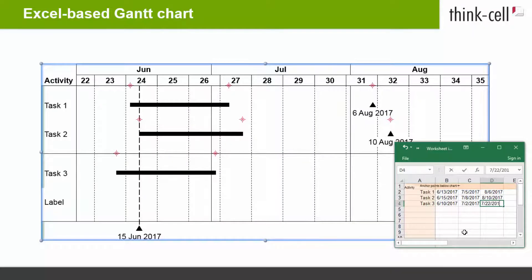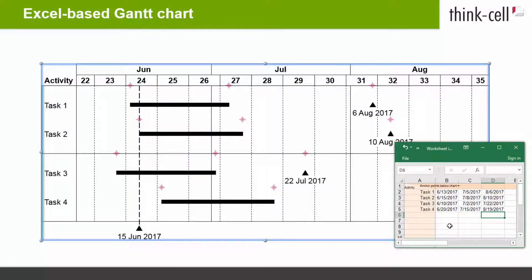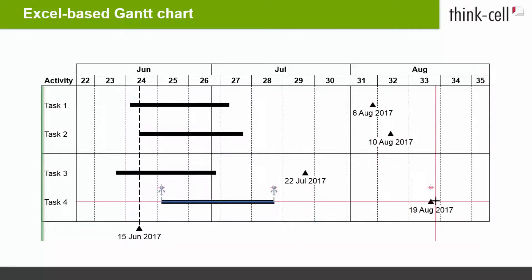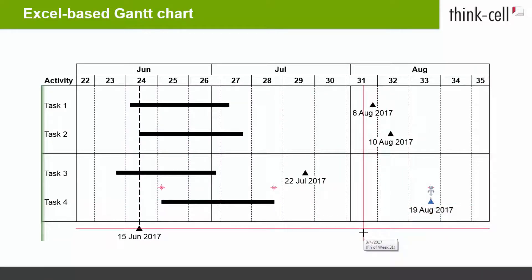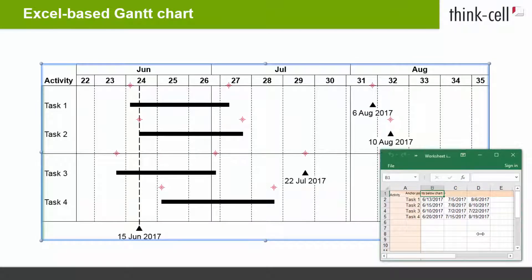The new items are modeled on the items in the existing row above. This also means that the new items are automatically anchored to the respective anchor points of the new row. That way, you do not have to manually insert and anchor the items for all activity rows, but can create a complete Gantt chart directly from the data sheet using the structure defined in the initial row.